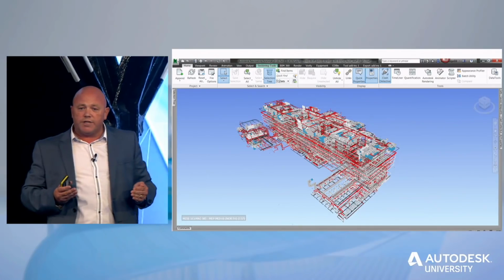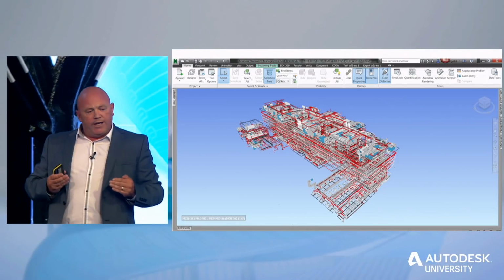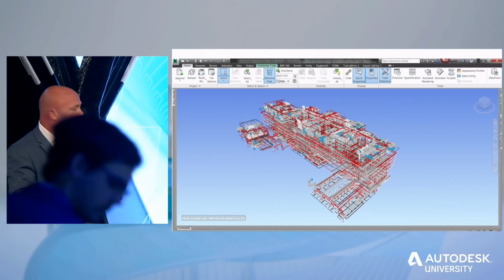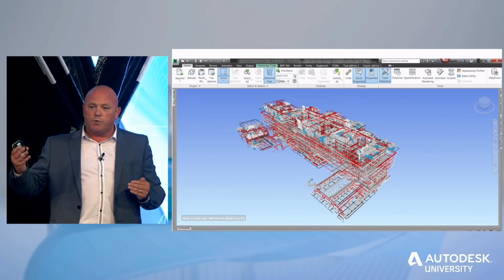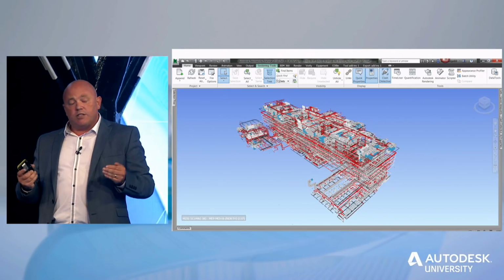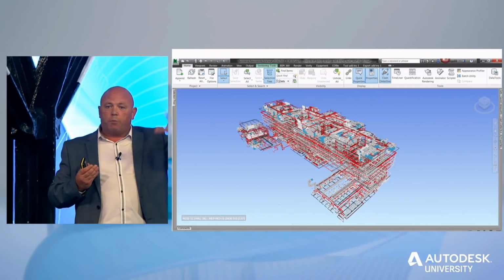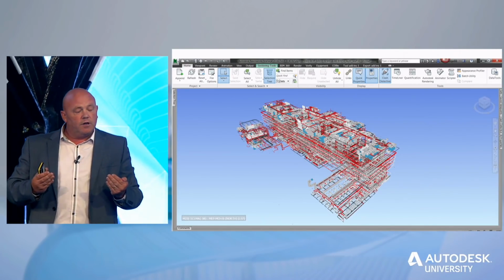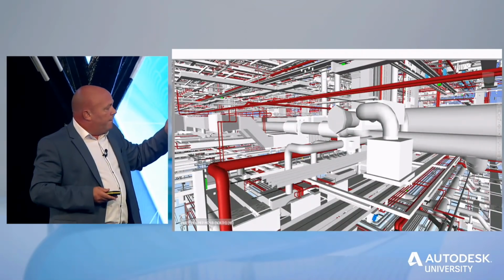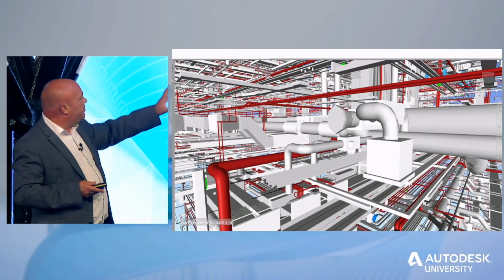But what's really worked is Balfour Beatty got an early appointment, and they brought in NG Bailey early as well. And what that allowed us to do was work as a fabricator who's going to install the building services to actually work with the design team who were Arup. And by working together, there was no real drop of information as it passed over. And what that meant was, when NG Bailey got on board, their design information was already in here.